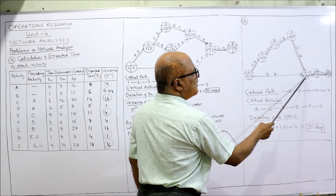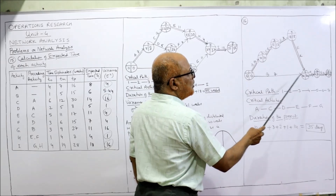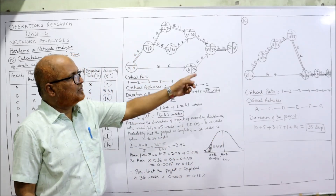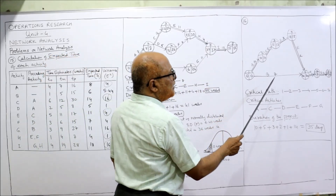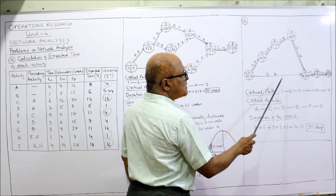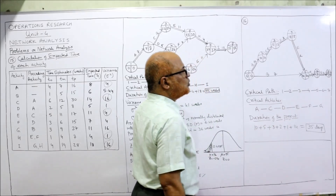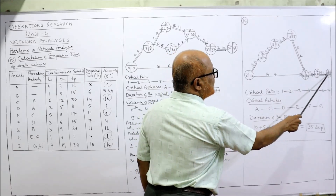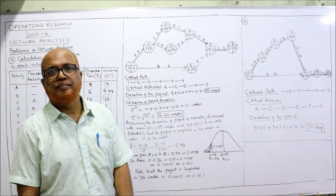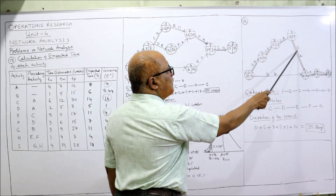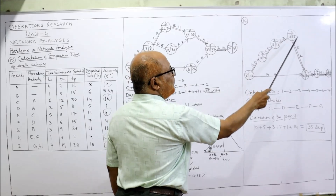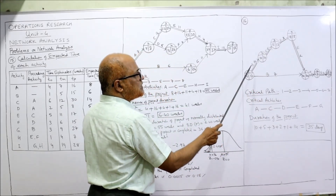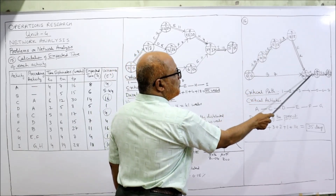Continuing the backward pass: 21 − 1 = 20. Two arrows bursting — take the minimum: (10 − 10 = 0) vs. (20 − 7 = 13) — 0 is less. The critical path is the longest path where EST and LFT values are the same. Looking at the path through events with values 0, 10, 15, 18, 20, 21, 35 — this is the critical path as it is the longest path. Show the critical path with double lines. Critical path: 1 → 2 → 3 → 4 → 5 → 6 → 7. Critical activities are A, C, D, E, F, G. Duration of the project: 10 + 5 + 3 + 2 + 1 + 14 = 35 weeks.